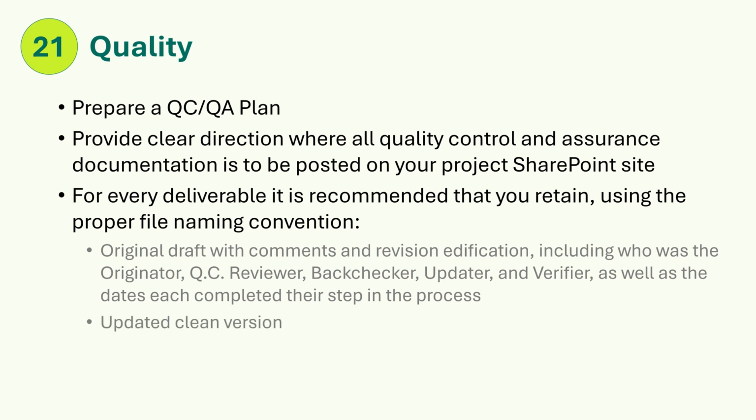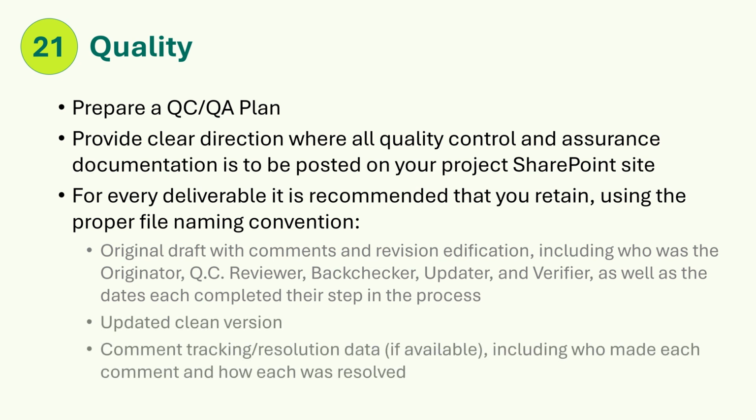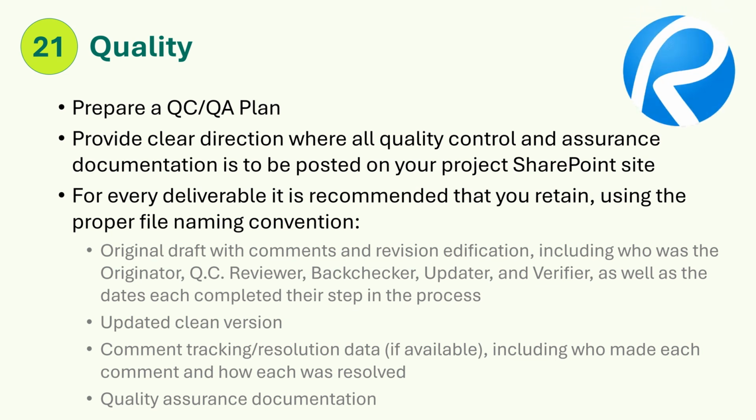Updated clean version. Comment tracking resolution data, if available, including who made each comment and how each was resolved. Quality assurance documentation. Bluebeam is an excellent software system to perform the review, provide comments, and it tracks and provides a summary of all comments, who made them, and how each was resolved.